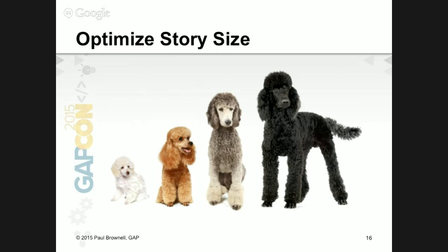If you make it too big, on the other hand, the user story could become unclear, can be too fuzzy. Like I'm gonna travel from San Jose to some other city somewhere. It's a little too big, a little too epic, because you have no idea, am I just traveling local? Am I traveling international, across continents, outer space? I don't know. The solution's going to be different. So making sure that there's enough clarity to be able to do it. And then the bigger the story gets, the harder it gets to fit into a sprint.